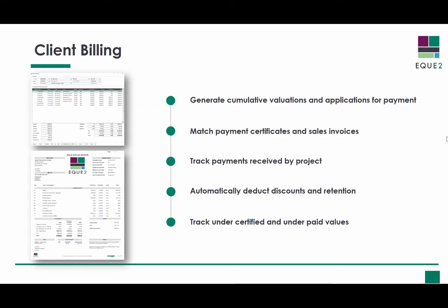Construct's Client Billing module provides the ability to generate cumulative valuations and applications for payments, to match payment certificates and sales invoices to your applications, and to track payments received into the bank account by project.